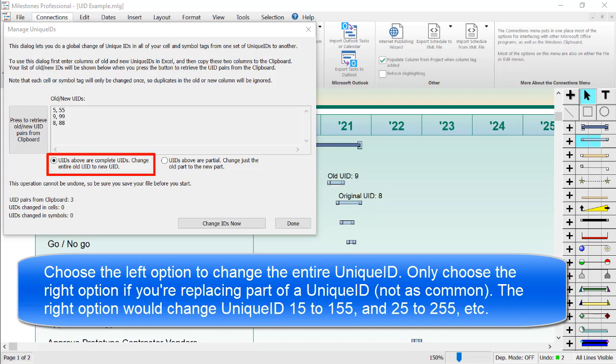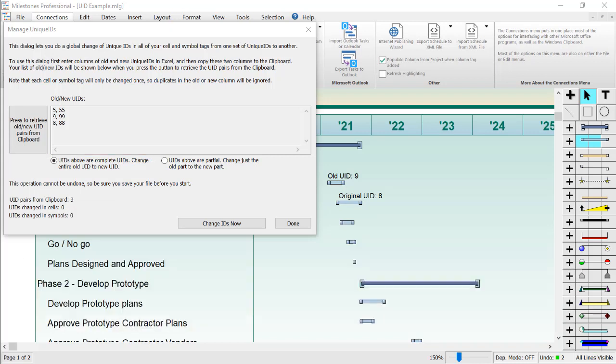Make sure to choose the left radio button on the bottom, unless you're planning to only change part of the unique ID string. For instance, if I pick the left option, it would change all unique ID 5s to 55s. If I pick the right option, it would also change unique ID 15 to 155, and 25 to 255. So be sure to choose the correct option for what you're trying to accomplish.